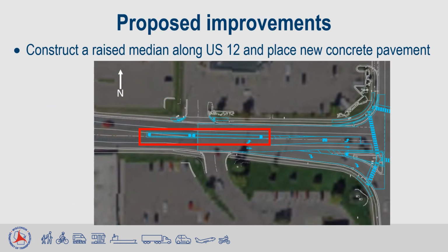Due to a crash history at the driveway access to the Walgreens and the strip mall to the south, this project will also install a raised median on US 12 while US 12 is reconstructed with new concrete pavement. The raised median, identified by the red box on the screen, will restrict traffic movements to these driveways to just right in and right out movements, which will reduce the number of crashes.